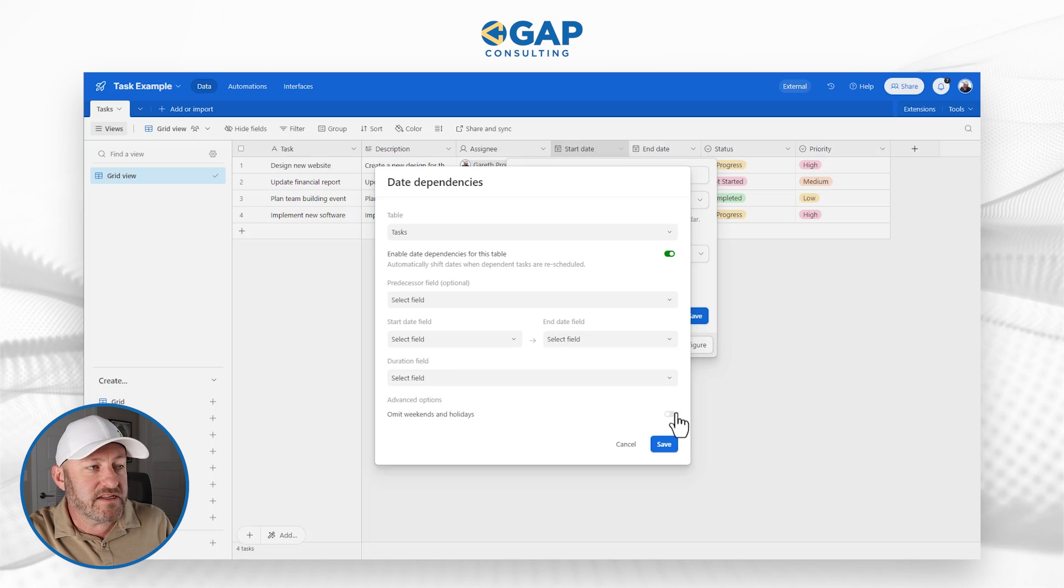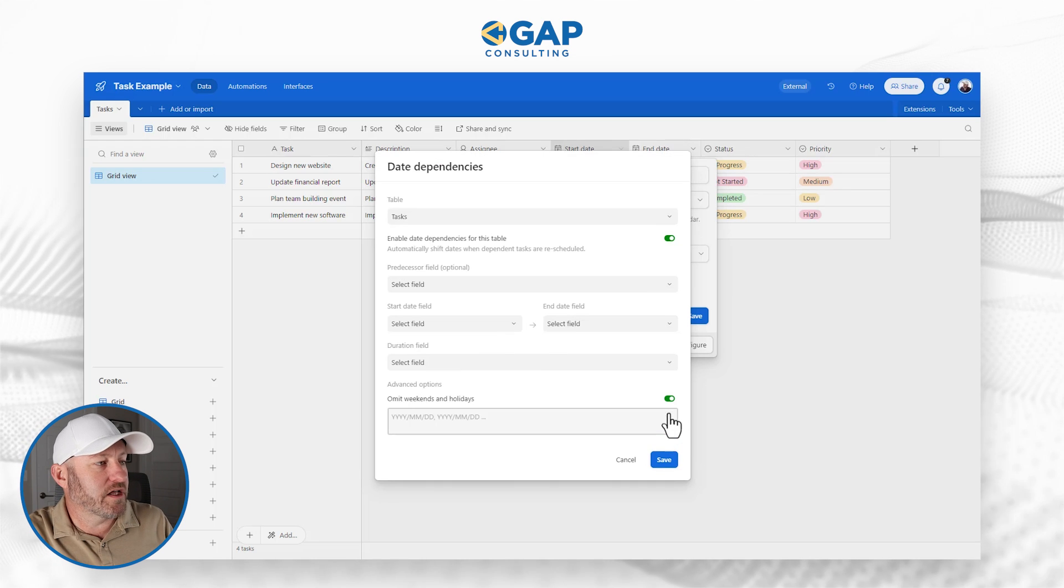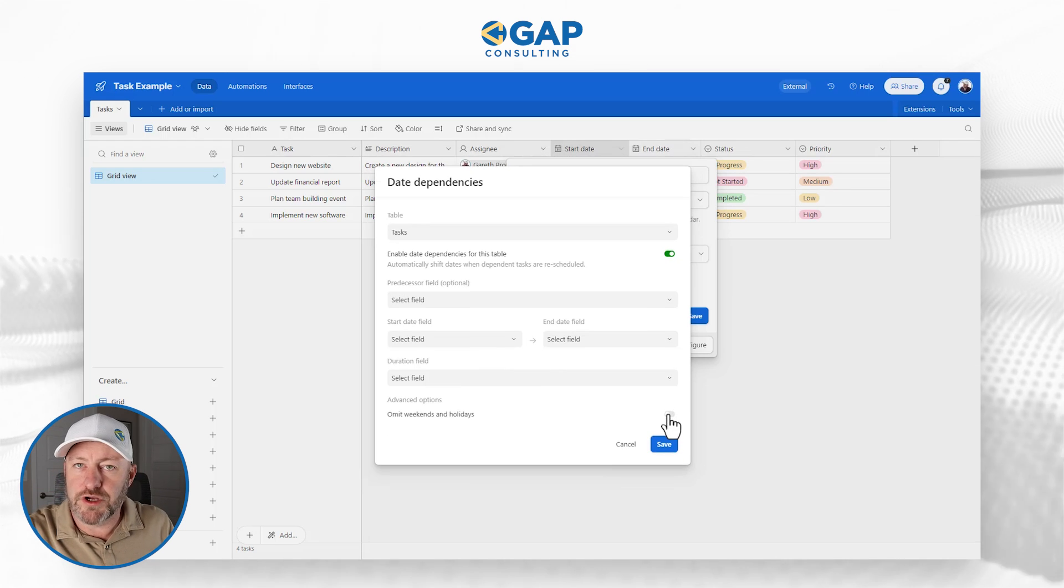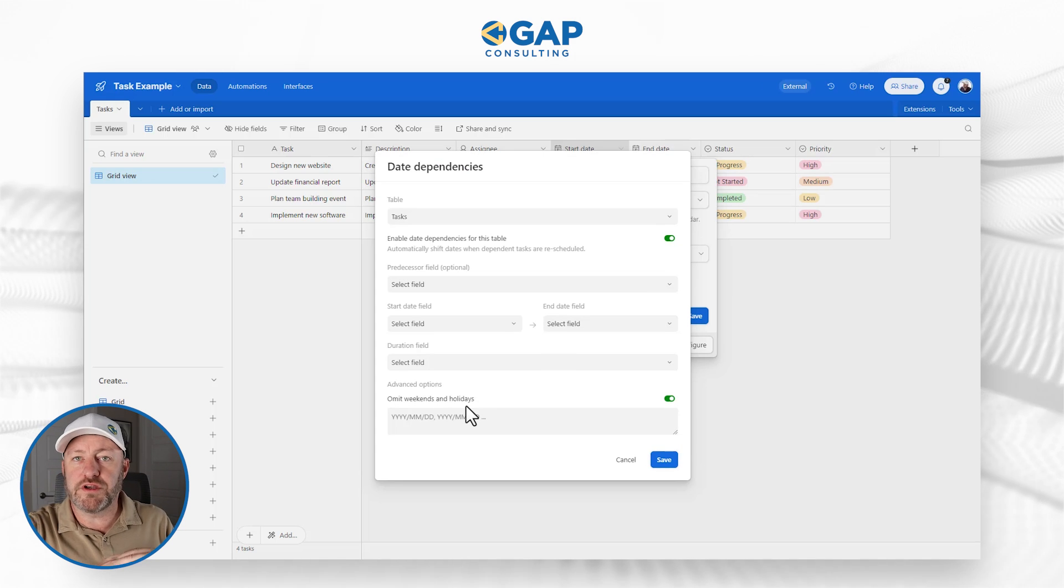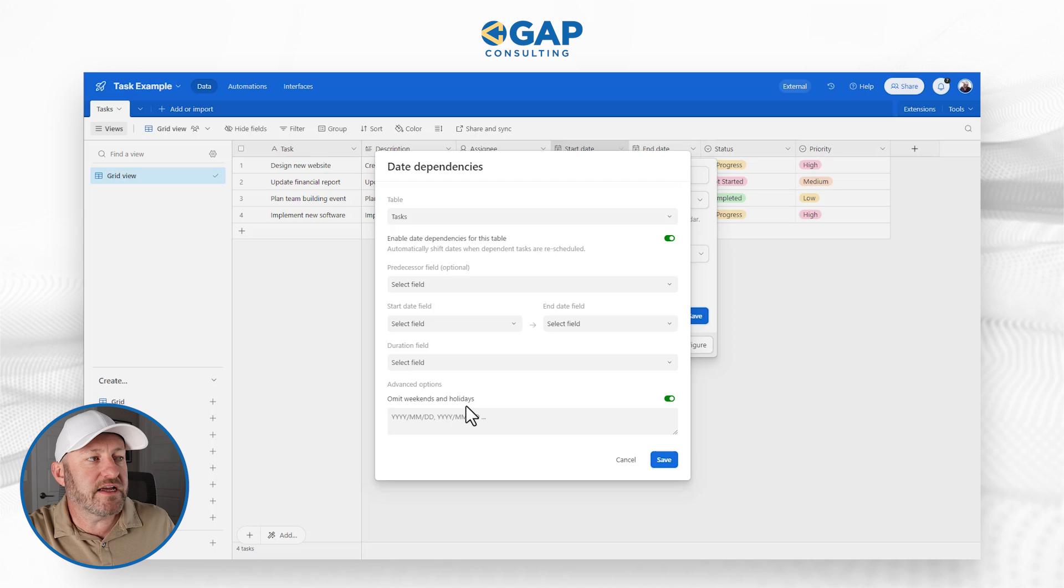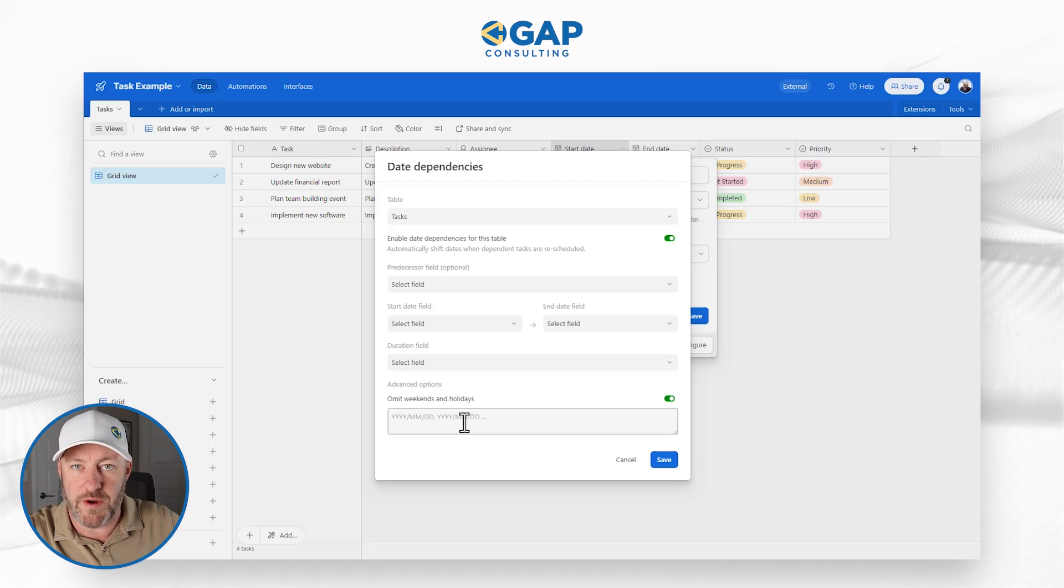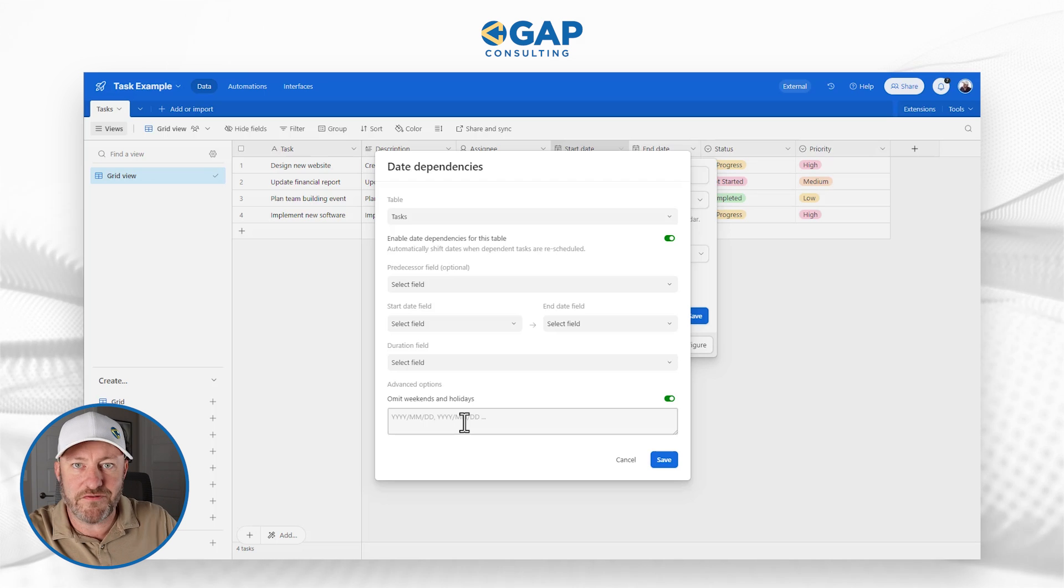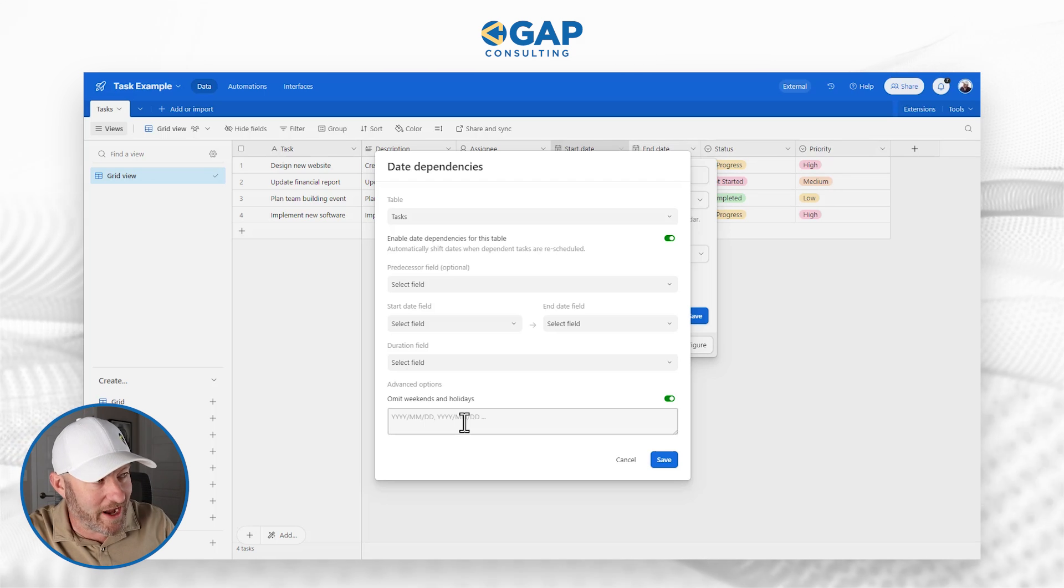Lastly, we have the advanced option section where we can choose to omit holidays and weekends. In this particular case, I'm going to keep that toggled off. But do know that if you select this, then we are going to not count weekends in our calculations. And you can additionally add some holidays that you want to exclude from your calculations as well. If you're taking certain days off, you don't want them showing up in your timelines.